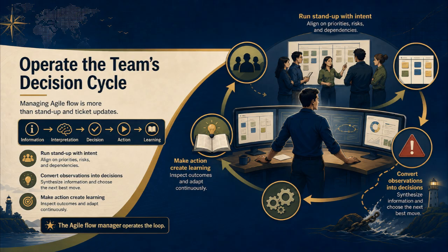The Scrum Guide defines the sprint as a fixed length cycle of 1 month or less, containing sprint planning, daily scrums, sprint review, and sprint retrospective. It also states that during the sprint, no changes should endanger the sprint goal, quality should not decrease, and the product backlog can be refined as more is learned.